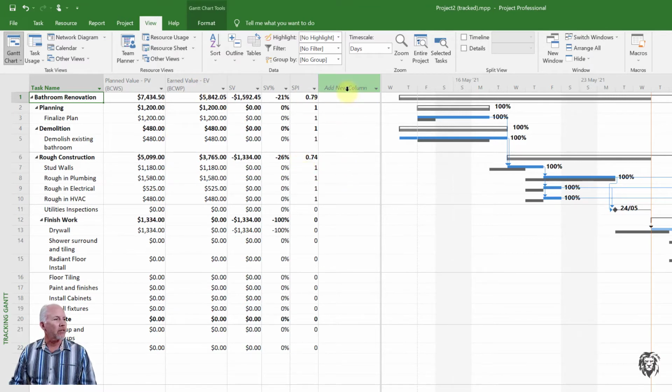The one metric that Microsoft Project doesn't offer, if it's one that your institution uses, is the cost schedule index, which tries to combine in a single index an overall performance metric that trades off cost performance with schedule performance. It's a simple thing to calculate. It is possible to add it here to Microsoft Project.